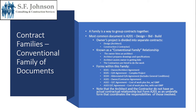So what is a family? A family is the way that they group the contracts together. The most common document is the A201, which is the design-bid-build set of documents. It's where the owner's project is divided into two parts: the design portion between the architect and the owner, and then the construction portion between the owner and his contractor, and subsequently all the subs that are hired. This is known as the conventional family relationship, where the owner hires the architect, and the architect prepares the drawings and the specifications, and also assists the owner in getting all of the contractors hired to do the work.